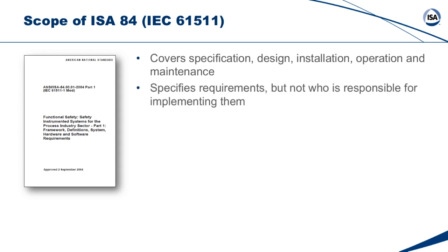Clause 1A says you have to comply with this standard, but it does not mandate who is going to be responsible for what steps. It is up to the team and the end user to say, well, we're going to do this, and the contractor is going to do this, and the system integrator is going to do that, and the consultant is going to do this, and everything else, to make sure nothing falls through the proverbial cracks, because systems are large, many organizations are typically involved, and we don't want things to fall between the cracks. That's the lessons learned that these standards provide.